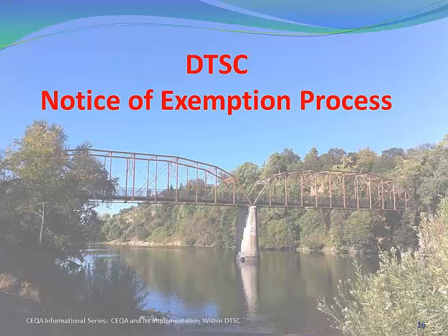So what we will probably need to do when we have renewals is it's going to be very, very important to have a description of what has already been permitted for that facility. What is the current facility permitted to do?